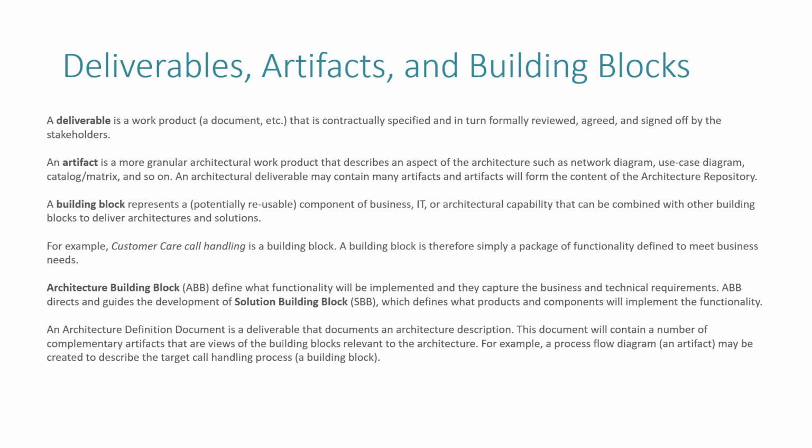Like in the past, when I was working as a solution architect, I used to prepare a solution architecture document, and in that document, I used to put different kinds of diagrams depending on different levels. I used to follow the C4 model and I prepared multiple diagrams, and all those diagrams were artifacts. But my contract didn't say that I will produce those diagrams, whereas my contract said that I will provide them an architecture document.